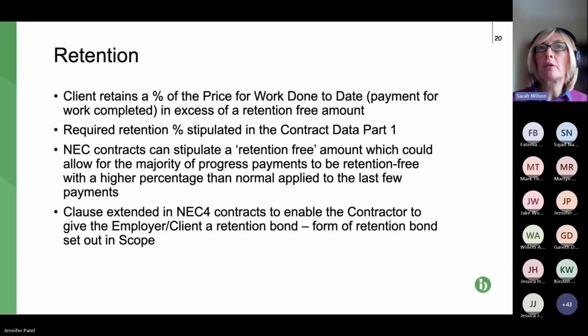It could be returned to the contractor. But for a long time now, that hasn't been the case. So if the party holding the retention goes into liquidation, then it's really unfortunate for the party whose money it is, because they're not going to recover it. They will just rank as an unsecured creditor, and be left to recover whatever they can on that basis.